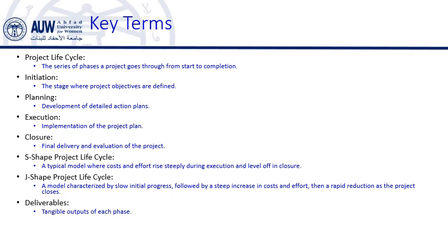As in a construction project, like building a skyscraper like Burj Khalifa, early planning and site preparation are minimal cost, while the majority of resources and effort are used during the actual construction, tapering off once the building is complete.